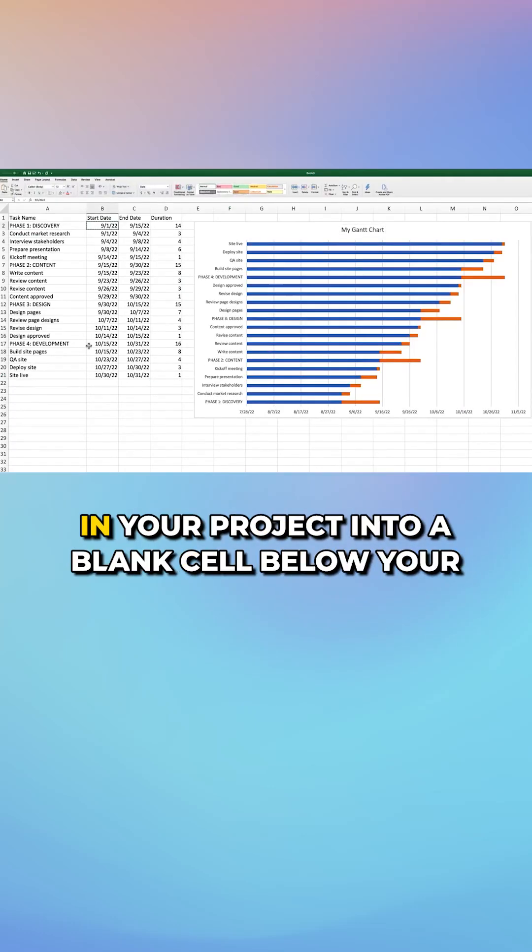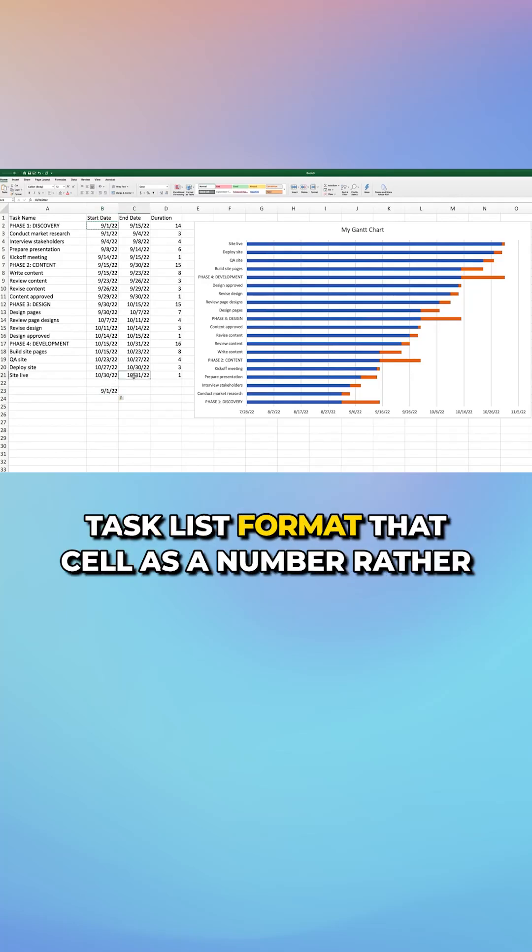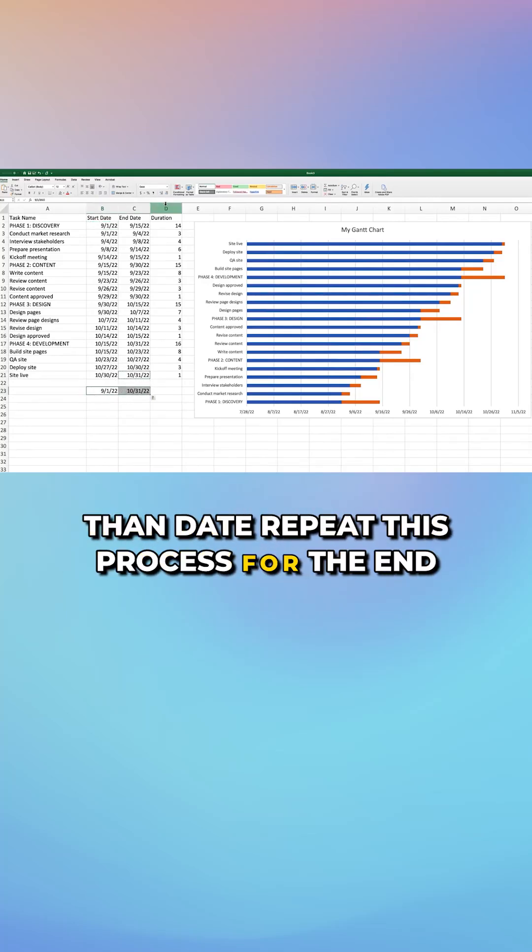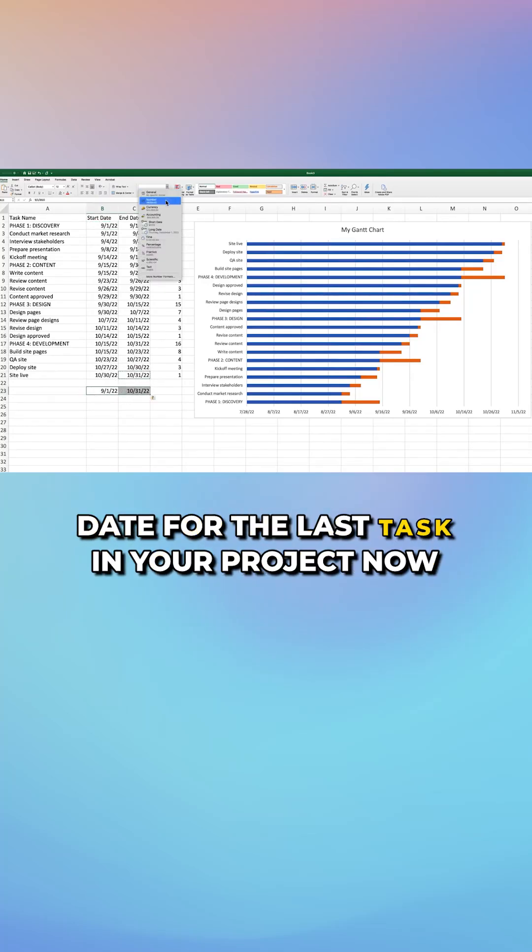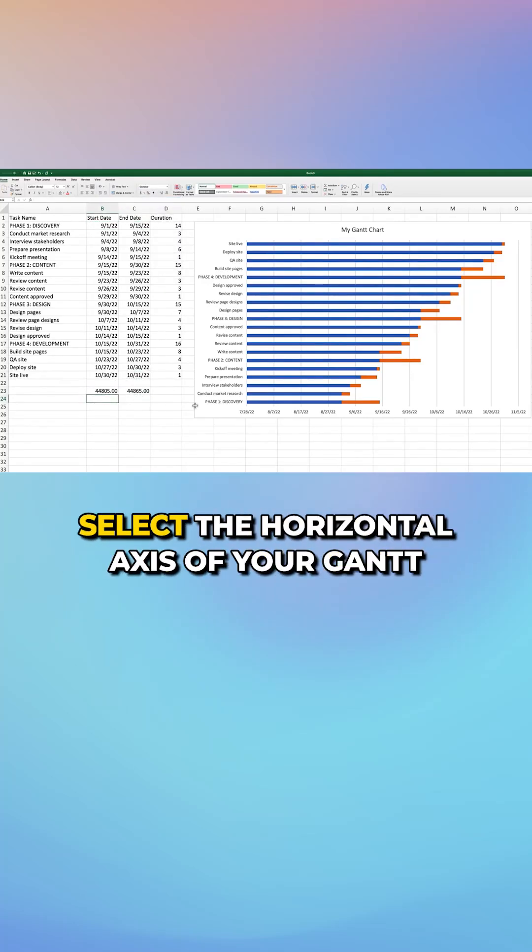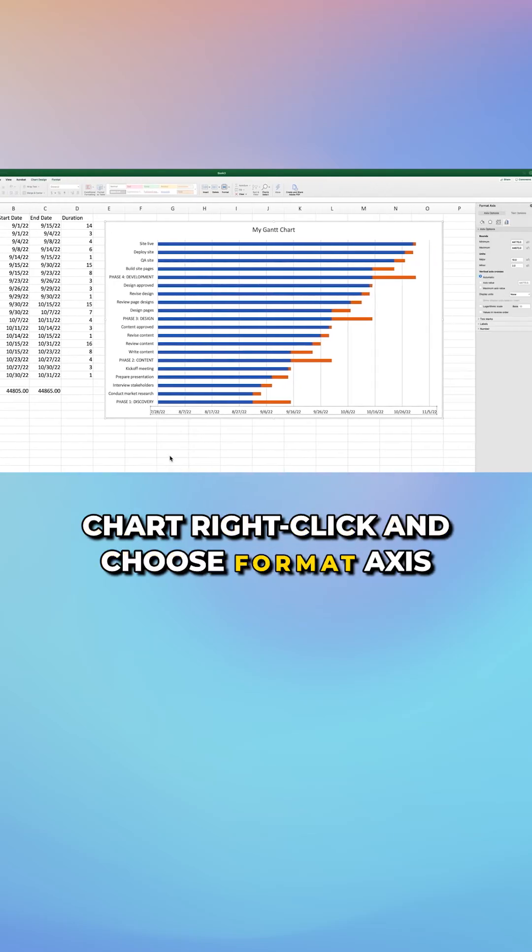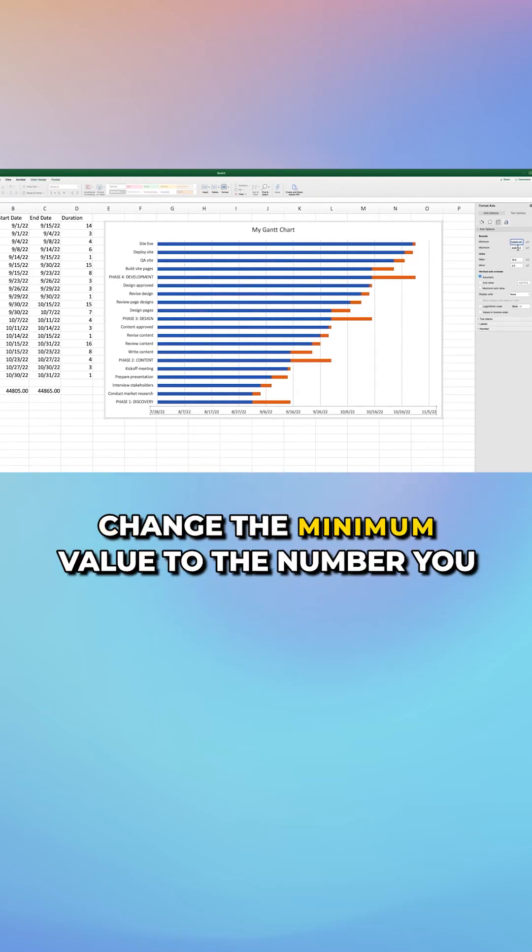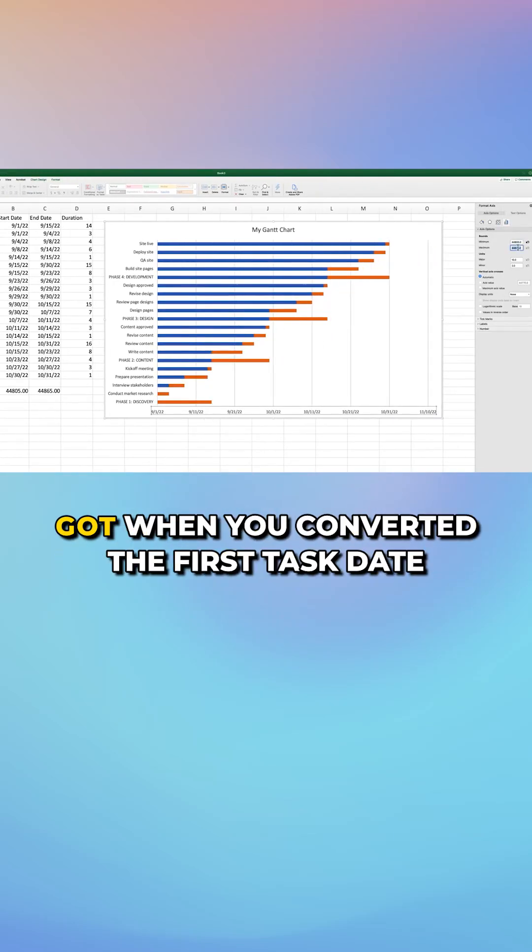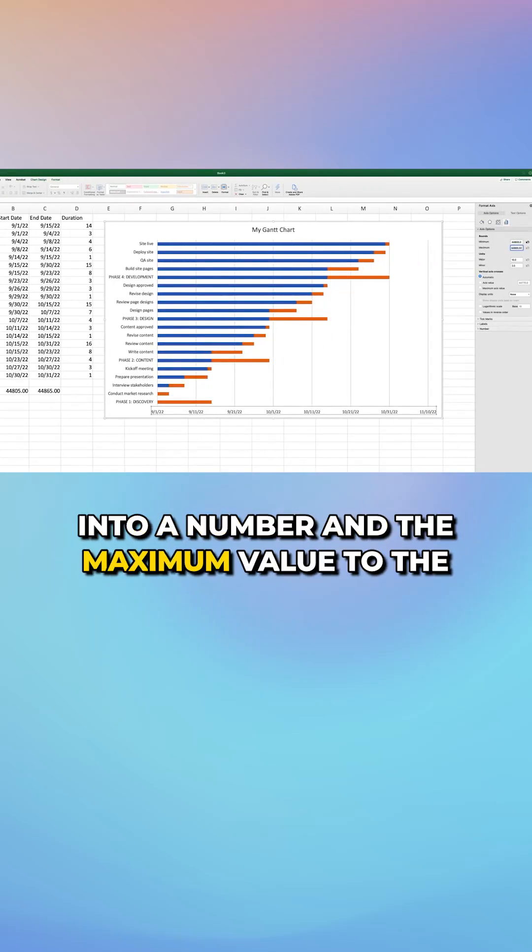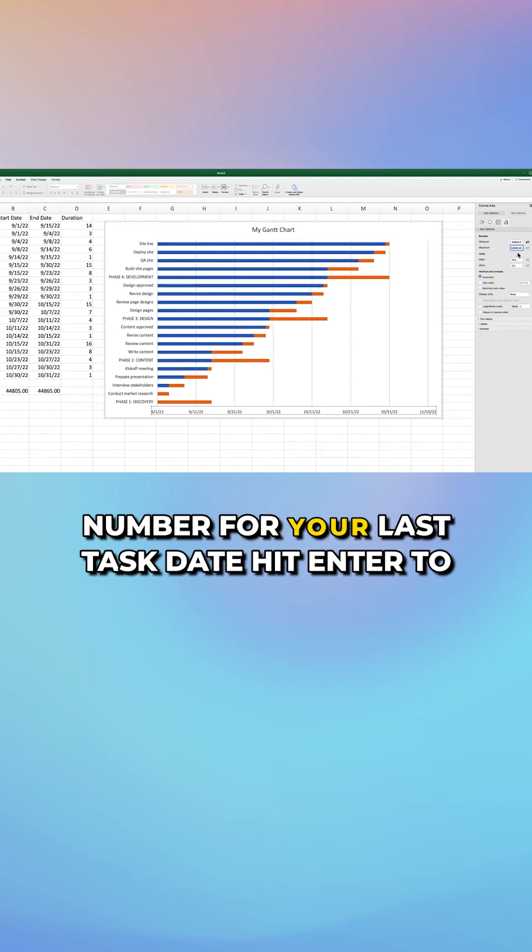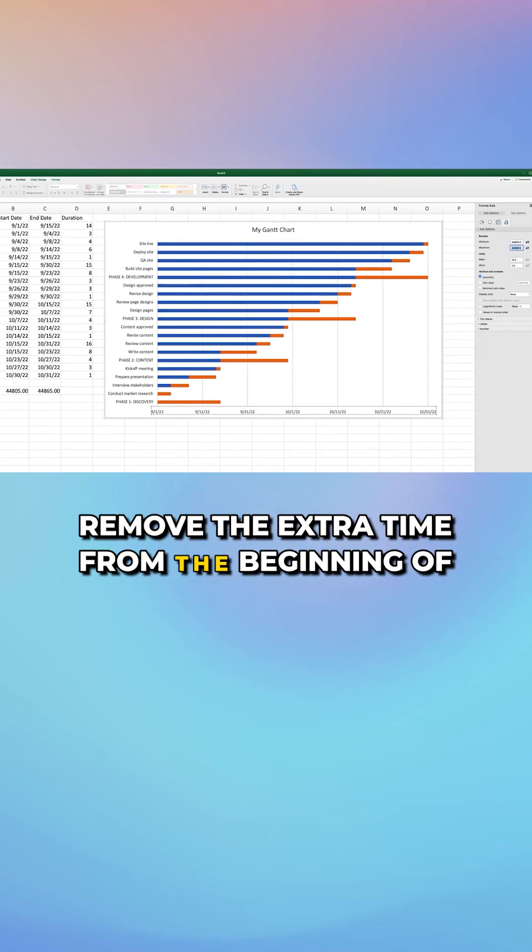Copy the start date for the first task in your project into a blank cell below your task list. Format that cell as a number rather than date. Repeat this process for the end date for the last task in your project. Now select the horizontal axis of your Gantt chart. Right click and choose format axis. Change the minimum value to the number you got when you converted the first task date into a number and the maximum value to the number for your last task date. Hit enter to remove the extra time from the beginning of your chart.